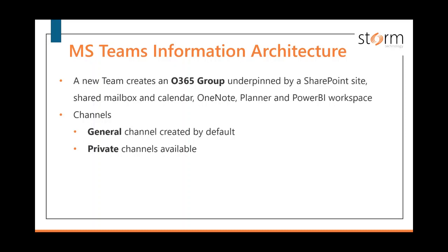But the problem with that is if you have a lot of different people working in a project and they're in different roles and there's just one single channel, then they're going to see all the noise related to other elements of the project that maybe don't apply to them. And if that's the case, there's a higher chance that they'll miss the items that are actually relevant to them. So by breaking out that project into different channels, whether it's by streams of work, or maybe it's the teams involved, or maybe you've got a project methodology that you use and you break it down by the different stages within that project methodology, you know then that people will know when they're looking for something which channel they should look in.